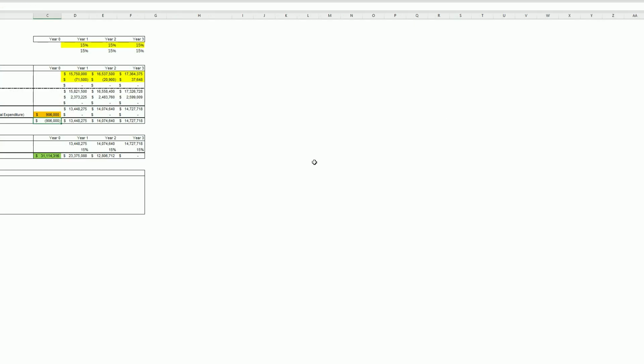Moving on to the analysis, the net present value analysis part. Additional revenues, of course, year 0 is going to be our year that we're doing developmental costs and developing the software. And moving on from year 1, 2, and 3, we gain a little more each year, but of course our operating costs are going to increase. As of currently, we're in year 3, we're currently working on that one, but year 2 is our last recorded record of it. We're about $12,806,712 in our net present value.